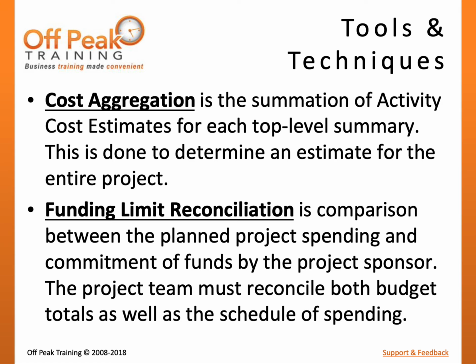In addition to agreeing to the grand total budget, they will also have to agree to the timeliness of funding. It is important that work is not scheduled to occur faster than the funds have been planned to be released into the project.